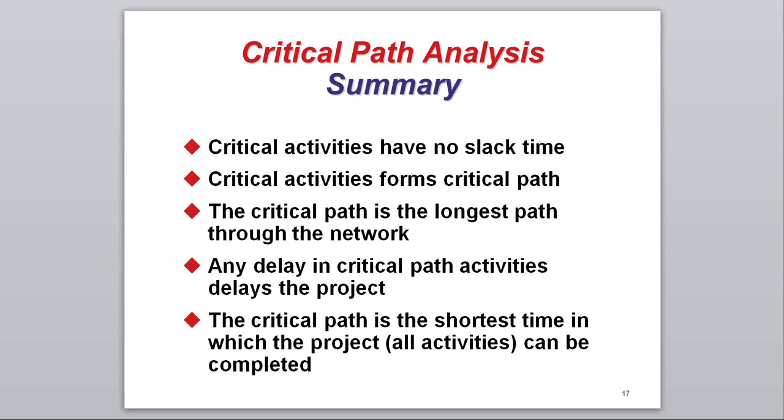In summary, critical activities have no slack time, and connecting the critical activities forms the critical path. The critical path is the longest path through the network. Any delay in the critical path activities will delay the whole project. The critical path is in fact the shortest time in which the project can be completed, which means all activities of the project are completed.